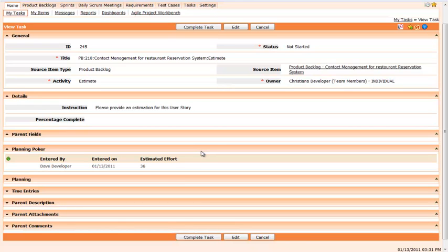So a new thought has come in, which is basically to let the team members see other people's estimated effort, and then allow them to create their own estimation. Of course, they won't be able to edit the other team members' effort, but they would be able to put their own effort in the context of other team members' effort.